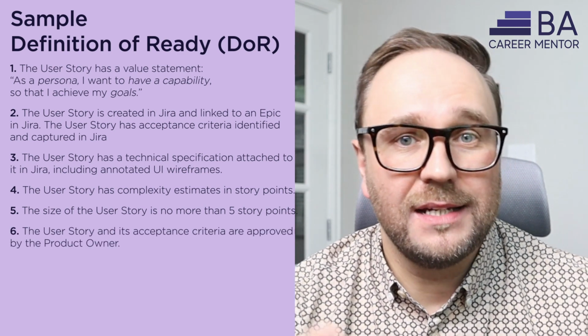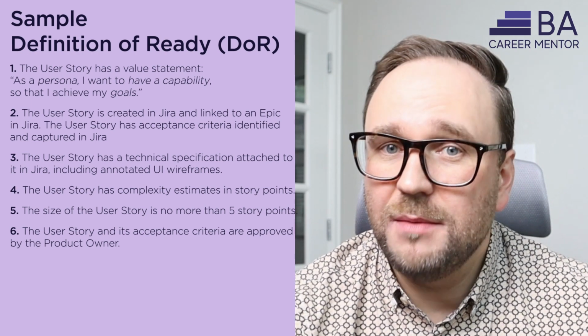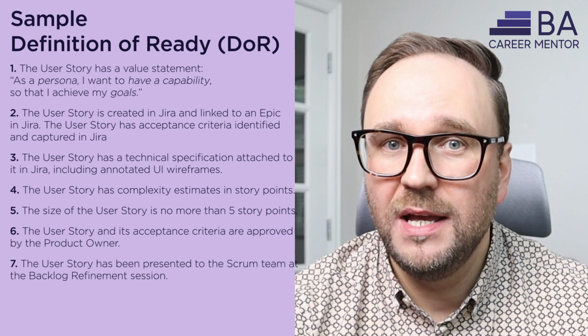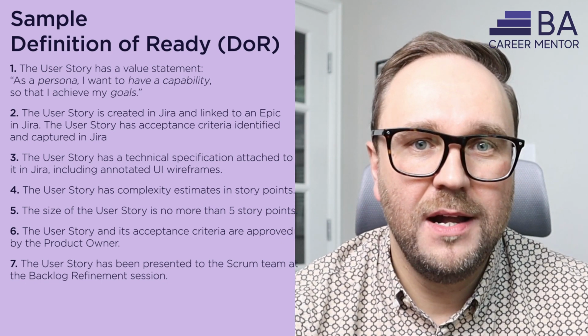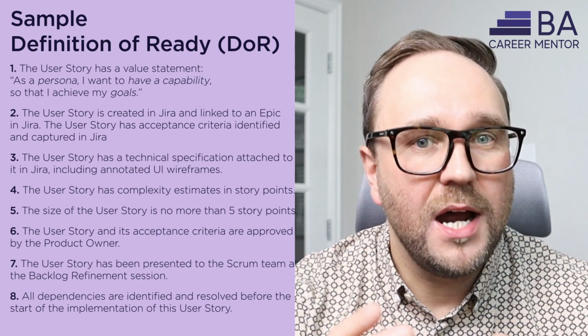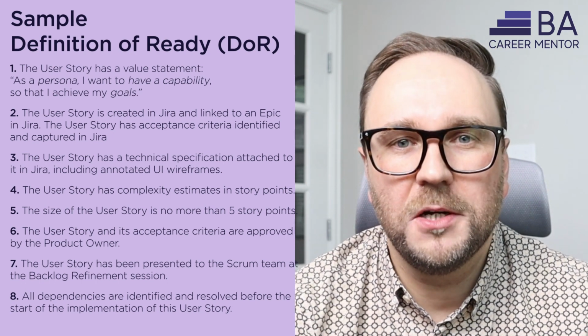User story and its acceptance criteria are approved by the product owner. User story has been presented to the Scrum team at the backlog refinement session. All dependencies are identified and resolved before the start of the implementation of this user story.